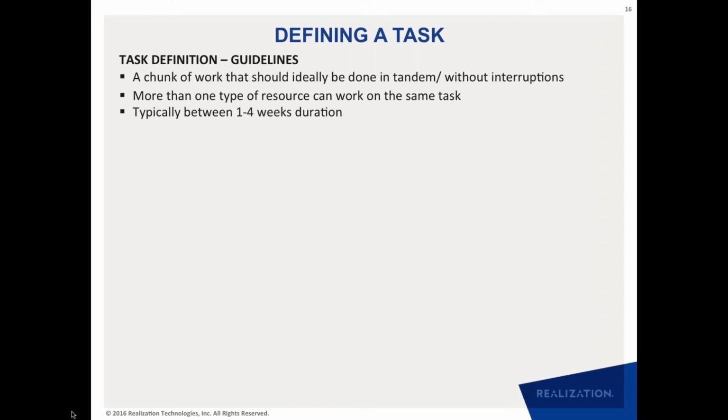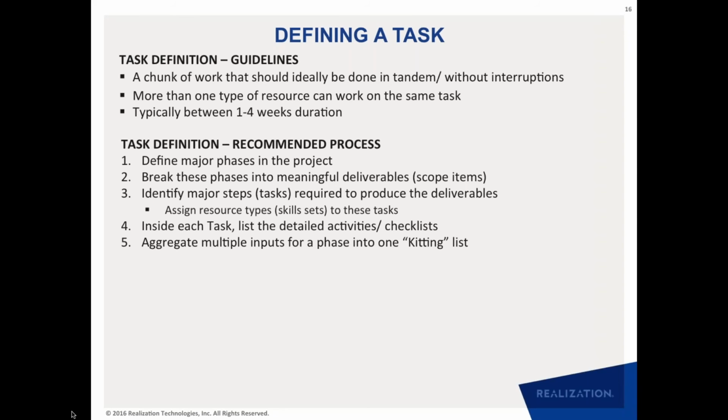And the other practical guideline is that typically a task should be between 1 to 4 weeks. Now, sometimes they can be more than 4 weeks, sometimes they can be less than 1 week, but a majority of them should fall into a 1 to 4 week duration.